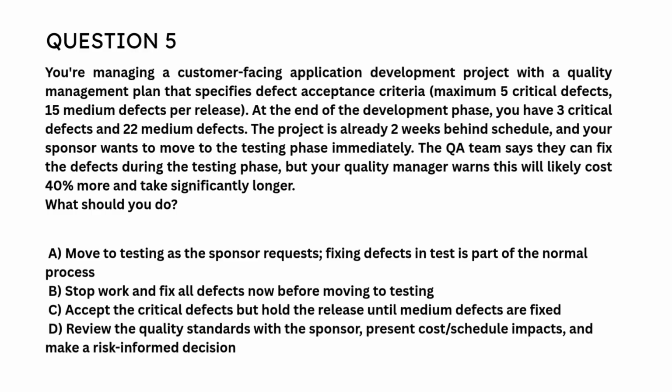A. Move to testing as the sponsor requests. Fixing defects in test is part of the normal process. B. Stop work and fix all defects now before moving to testing. C. Accept the critical defects but hold the release until medium defects are fixed. D. Review the quality standards with the sponsor, present cost, schedule impacts, and make a risk-informed decision. Correct answer is D. Review the quality standards with the sponsor, present cost, schedule impacts, and make a risk-informed decision.